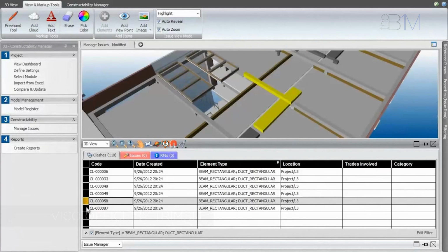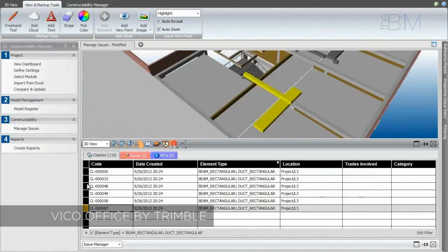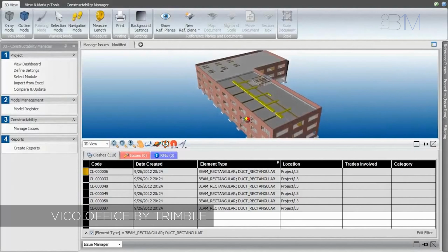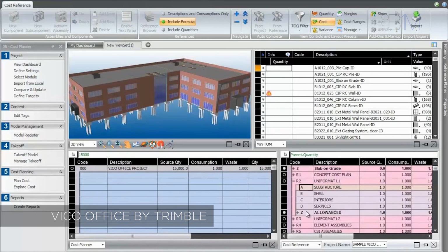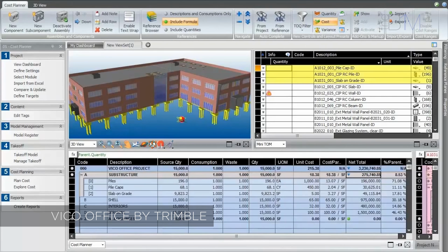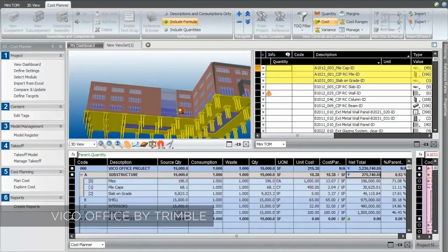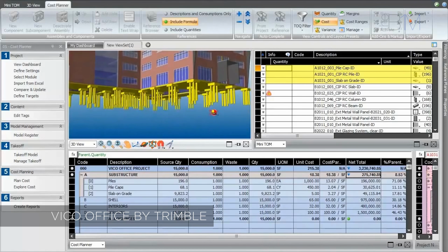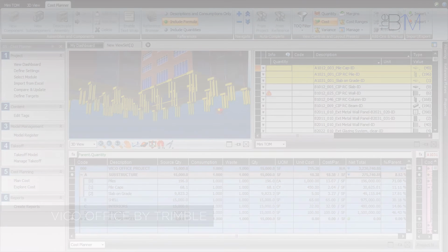Counting can be done automatically, saving time and patience. You can see what you're costing clearly in 3D form, and you can be automatically notified when changes are made in the information model. It's relevant to those purely involved in the delivery phase too. With solid 4D program data and a robust contract sum, you can track predicted and actual spend over the course of your project, which is really useful for monthly cost reporting and budgeting.